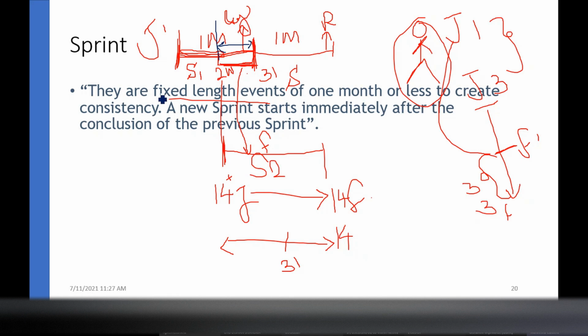It's a fixed length of events. So you should understand fixed length of events. You can't add or remove the events here and there from time to time. If it is changed, immediately stop and immediately start the next sprint. That's the proper solution.